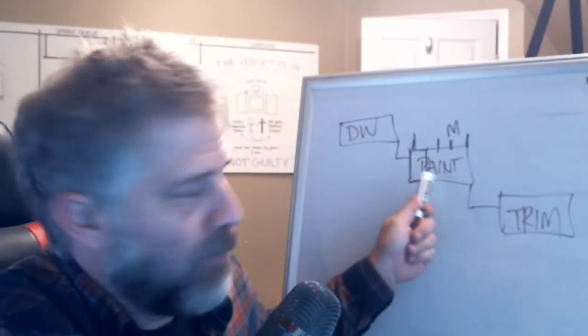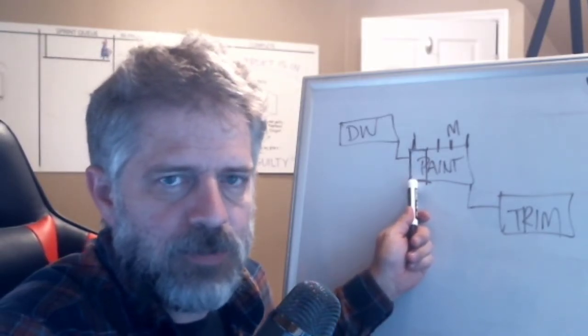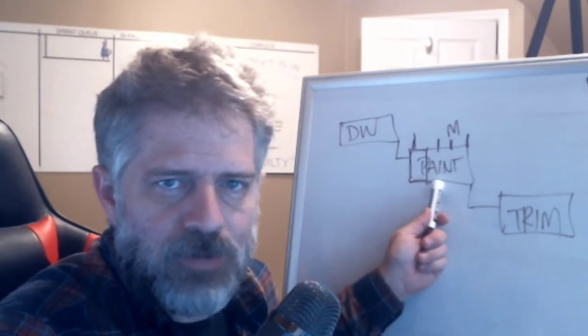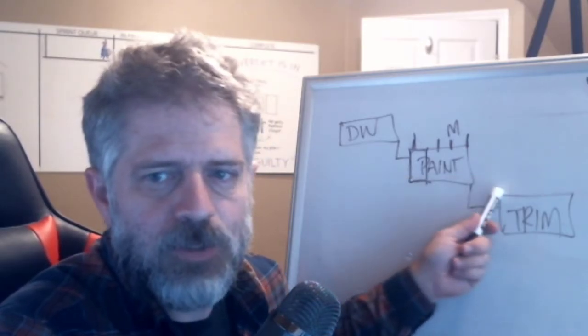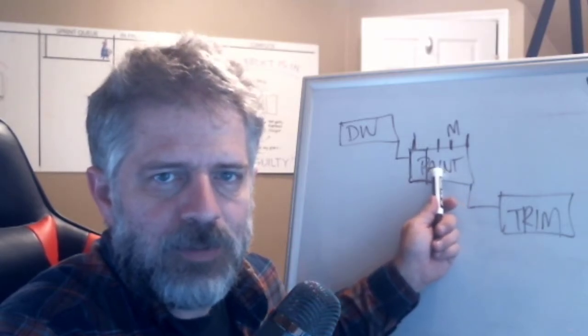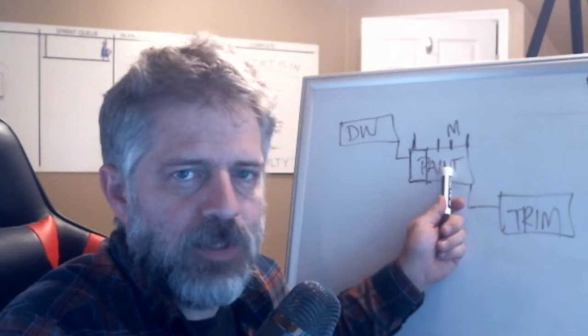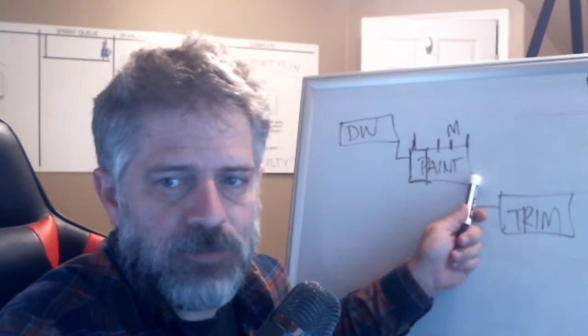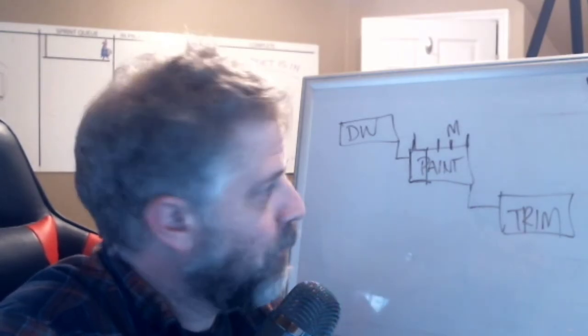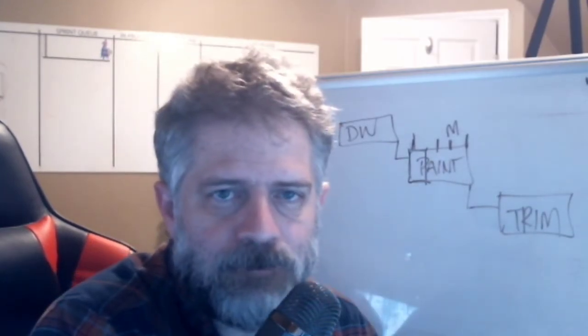And so often, before I started to understand margin, I would have that conversation, but I didn't really care whether they started exactly on that time because I knew I'd added margin to the end. But then once you get part of the way, close to where most of the margin's been consumed, all of a sudden it gets really stressful. And so often my trim carpenter will come in and the painter's still there doing touch-up.